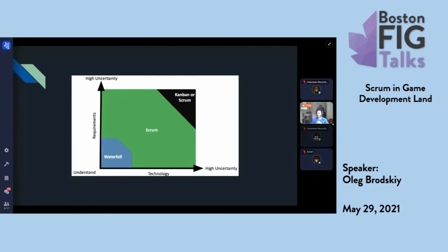But if you're not using a waterfall model, then there's an opportunity for you to pivot and say, okay, hey, let's put aside all the shooter stuff. Let's focus on the stuff that's working. Let's focus on the card game. If you look at applications like Slack and Discord, both of them started out as video games, and they built this chat app, and they found that the chat app worked a lot better than the stuff they were doing, so they pivoted. And if they were sticking truly to a waterfall model, they wouldn't be able to pivot because the requirements up front involved creating a game. Whereas in something like Scrum or Kanban, your requirements are much more fungible.